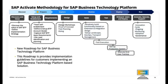SAP Activate Methodology for SAP Business Technology Platform: The SAP Activate methodology for SAP Business Technology Platform provides implementation guidelines for customers deploying BTP-based solutions. It includes phases, deliverables, and tasks following the SAP Activate framework, with accelerators linked to relevant tasks for easy access. Deliverables and tasks are listed sequentially, though some may need to be parallelized for efficiency. This roadmap will be rolled out in phases, starting with a focus on governance and key implementation milestones, and later expanding to specialized areas like app development, automation, integration, data and analytics, and AI.